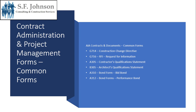Some common forms within the set include G714, construction change directive, which is used in place of a change order when all parties don't have time to agree, or the owner directs work to proceed and details are hashed out later. G716 covers RFIs. As noted in our RFI class, you should be able to review your RFI within your contract, and this is the specific form being referenced.